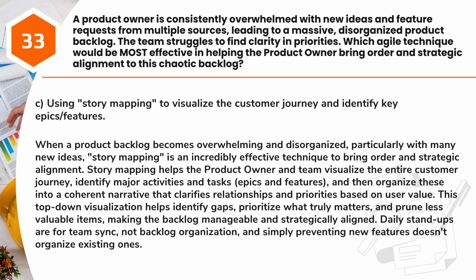Answer: C. Using story mapping to visualize the customer journey and identify key epics/features. When a product backlog becomes overwhelming and disorganized, particularly with many new ideas, story mapping is an incredibly effective technique to bring order and strategic alignment.